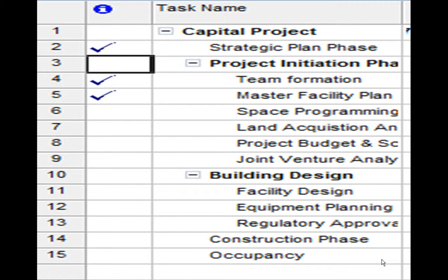We will use PERT to find estimated duration of the project. In order to do so, we must enter the pessimistic duration, expected duration, and the optimistic duration for each of the tasks. Once we're done, then we must use the PERT analysis on Microsoft Project, and the durations were rounded, which showed that the planned duration was 862 days.